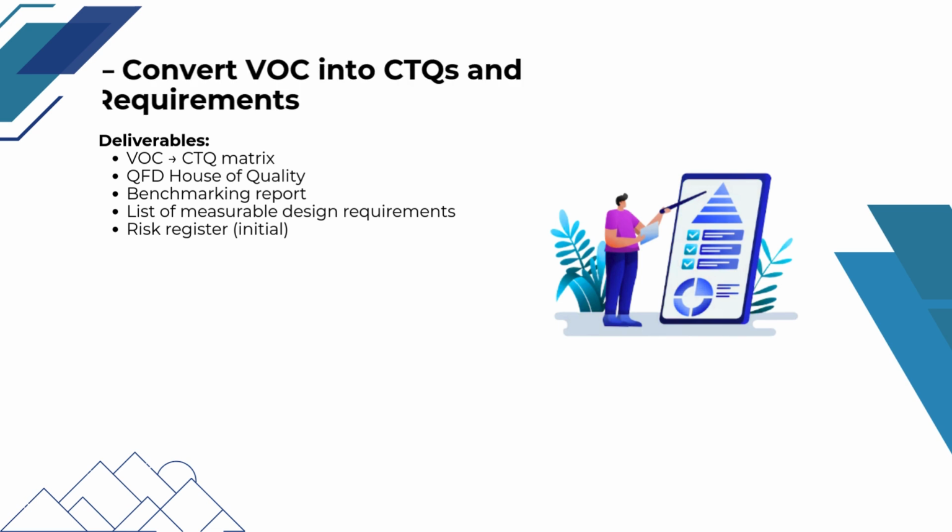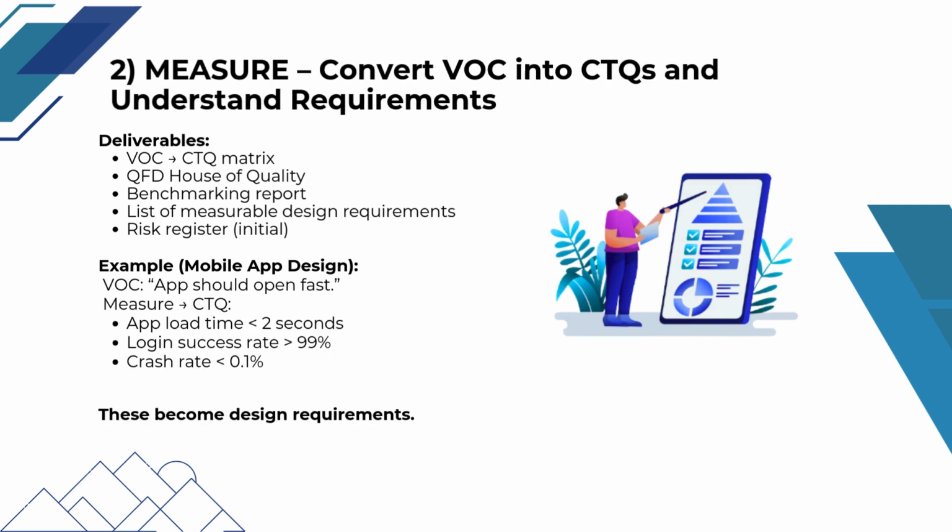In the measure phase, key deliverables include a VOC to CTQ matrix, a QFD or House of Quality benchmarking report, a list of measurable design requirements, and an initial risk register.